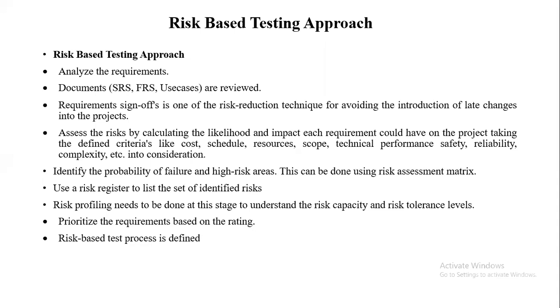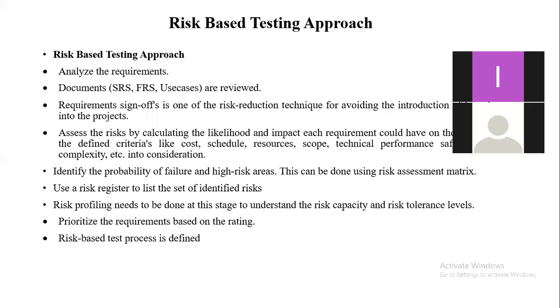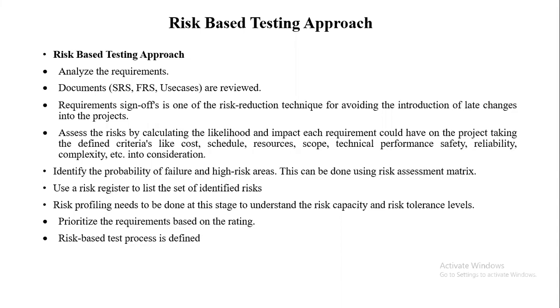That means whenever the client gives you the requirements, we need to take the requirements and sign them off. That means further requirements cannot be given in that way. If at all they want to give something again, they have to come through the change team. The team will analyze what changes will occur if this happens, and they will monitor it, and they will not accept any further requirements. If at all they want to give, they need to contact the change team and explain why they want to change, and only after that can they do it. Okay, so that we have to do in this approach.